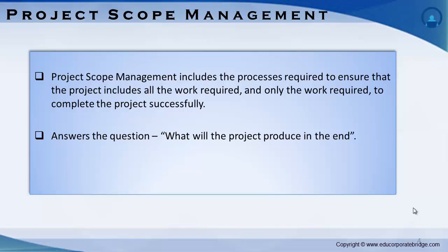During project initiation, when the scope is being developed, any additions to the project scope will have the least impact on the project schedule or cost, because the schedule and cost estimating have not been finalized and no work will need to be discarded.